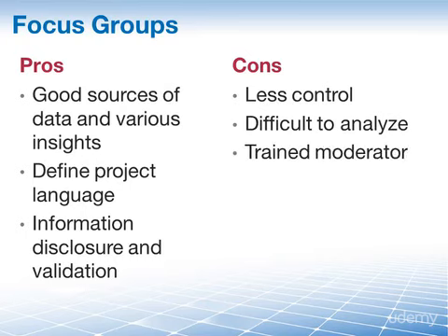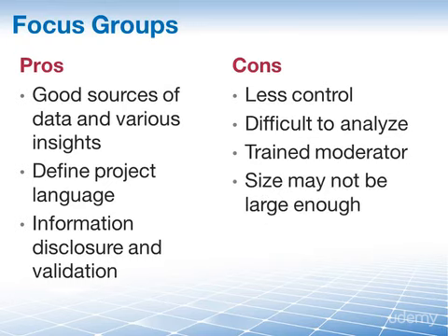Some focus groups require a trained moderator because groups are quite variable and can be tough to get together and keep together. And finally, the size of a focus group may not be large enough to be a good representation, a sample of stakeholders, so that the information you get from this may not include everything that is required